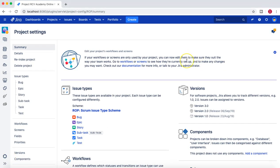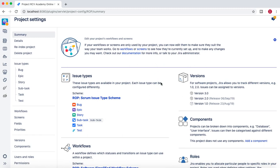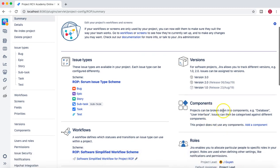A similar thing can be done with components. Components are subsections within the project — for example, you can organize UI issues under a 'UI' component, or database issues under a 'database' component. You can define multiple components to categorize issues that fall into a particular subcategory, depending on what your project is and what technology you're using.